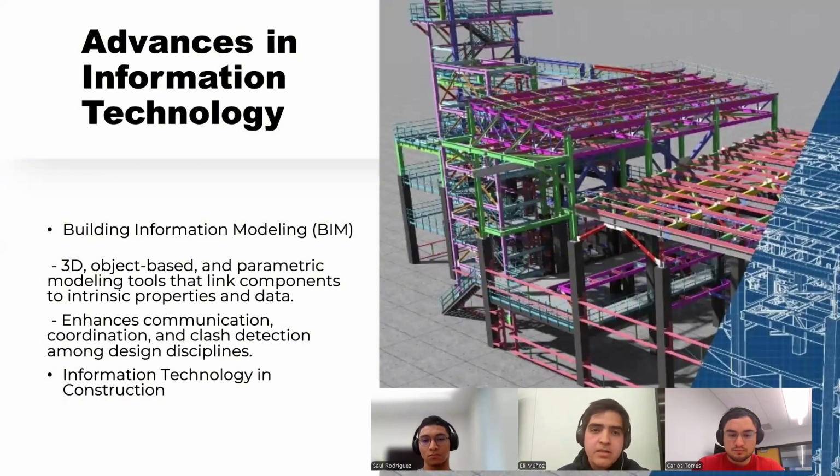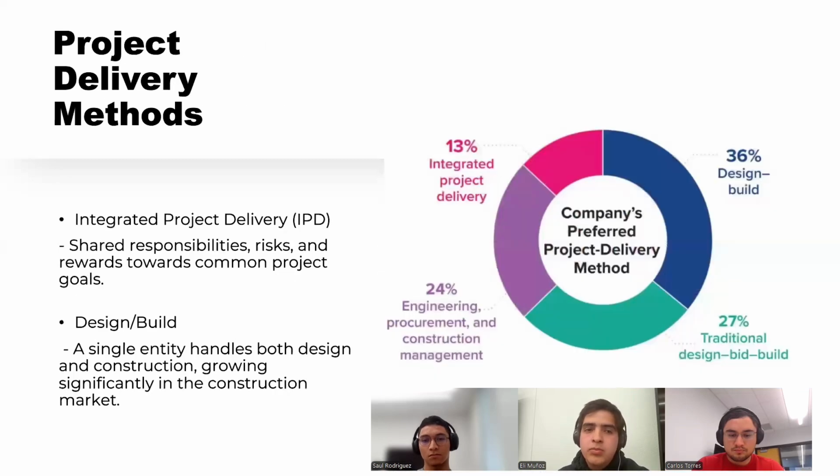For project delivery methods, there's integrated project delivery (IPD). Its framework is a collaborative approach involving the design team, construction team, and the owner, with shared responsibilities, risk, and rewards towards common project goals. So actually, in this one, they work together to develop the building and the design.